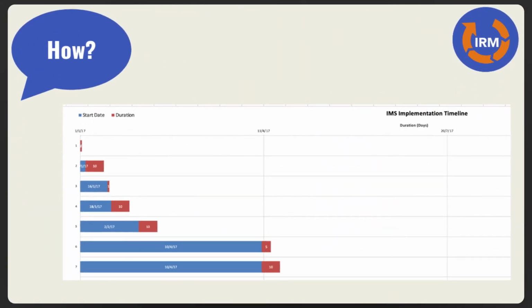We're going to upload two templates, a simple one and a more detailed implementation plan. The latter one you can use if you've got a fairly big implementation project, if you're trying to meet several standards, 2 or 3 of those ISO management system standards. This slide's just highlighting that, yes, if you put in a start date and an end date and a duration for some of your action items there, it'll actually generate a little bit of an implementation timeline for you.